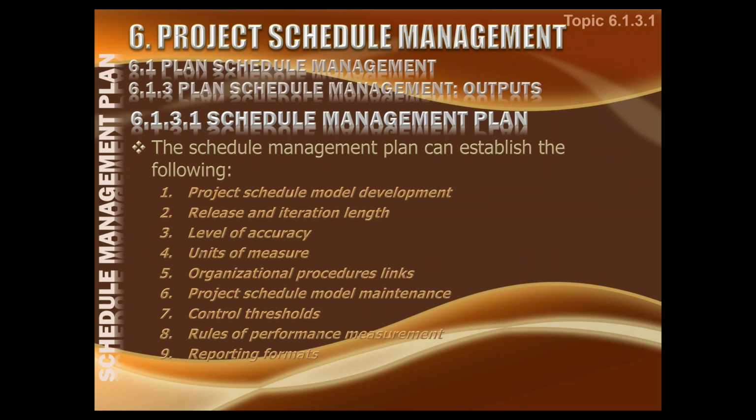This should establish the schedule model, how the schedule model will be developed. And I have already discussed with you establishing the scheduling methodology, the tools, project specific data, putting them all together into a schedule model, and then creating the instances and ultimately getting it baselined. This all is the process of schedule model development. How that can be done, this would be earmarked there.